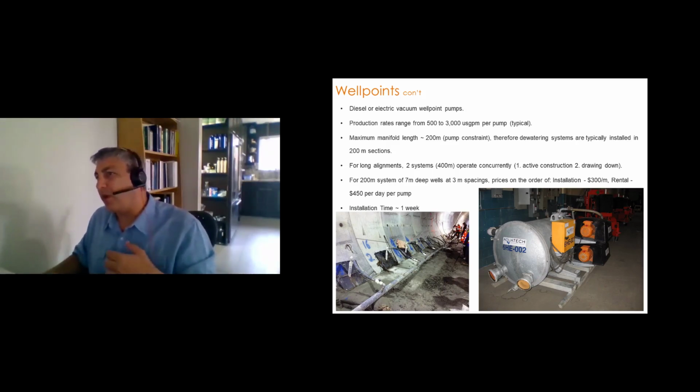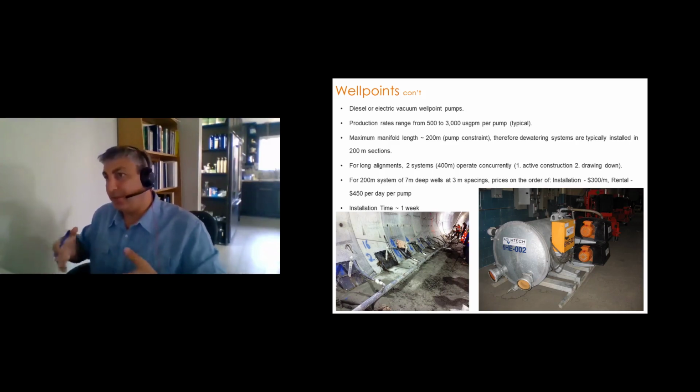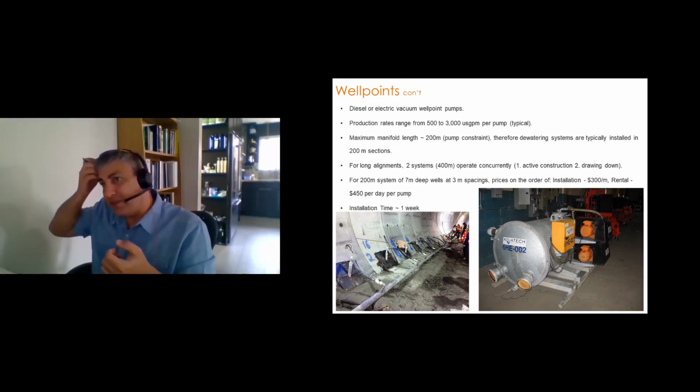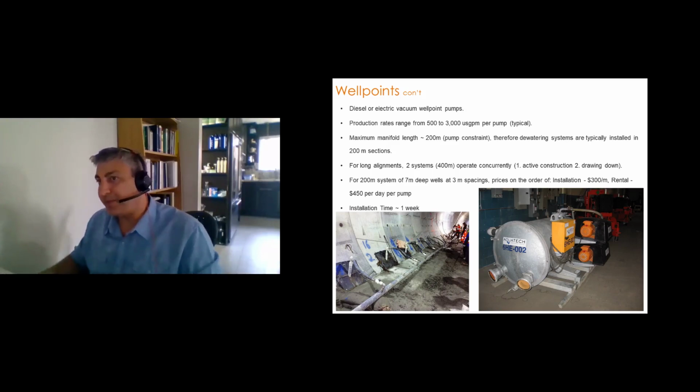So well points can only operate on about a 200-meter long system. After that, the system becomes too long to maintain the partial pressures to keep the vacuum. Rental prices for a 200-meter system are generally about $450 a day per 200-meter system and pump. Right? And on a per meter cost, it's generally about $300 per meter length of a well point system.